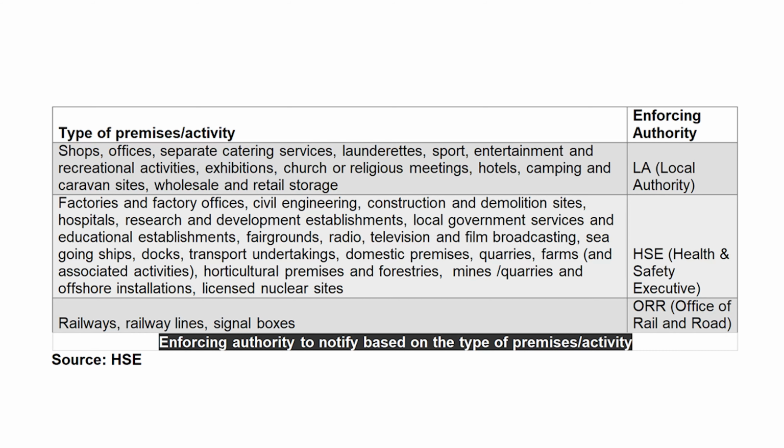Unlike licensed work, there is no minimum notification period to notify the HSE or the enforcing authority. The form that you use for this type of work is called the ASB/NNLW1. The licensed contractor must also hold a medical certificate that is reviewed every 3 years. And I'm just going to flash up a table of the enforcing authorities and when you need to go to which one. Make sure to pause the video if you want to review that for a bit longer.